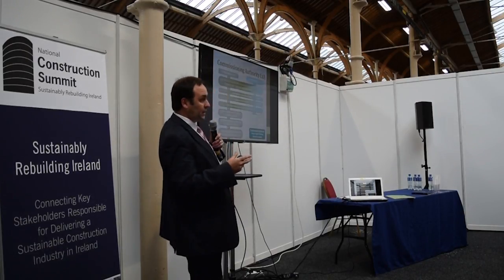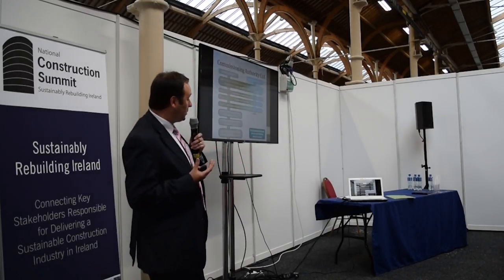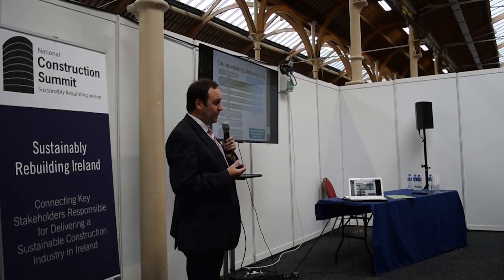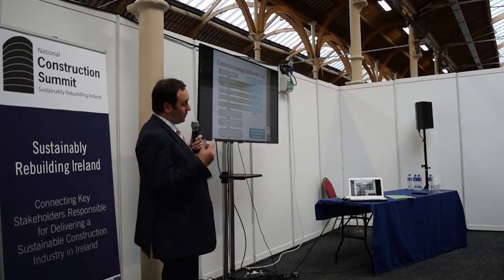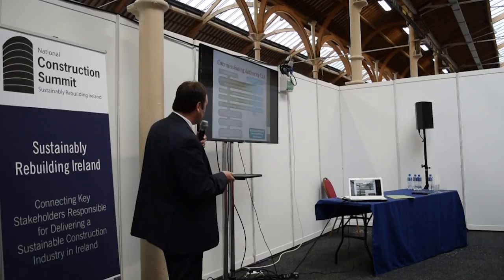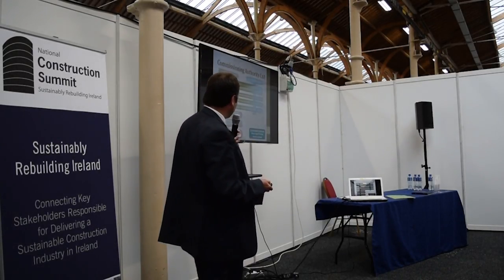Now, if you're only looking at fundamental commissioning, it can also be an impartial employee, or what they call a disinterested employee of the actual project itself, or an independent subcontractor of the construction firm. In LEED 2009 version 3, if the project was less than 50,000 square meters, you could actually have it as a member of the design or the construction team for fundamental only. That's been reduced now to 20,000 square meters, or approximately 1,850 square meters for fundamental commissioning only. They can be an employee. The key part is that the commissioning authority will always report all their findings directly to the owner. They have to be independent with no conflict.